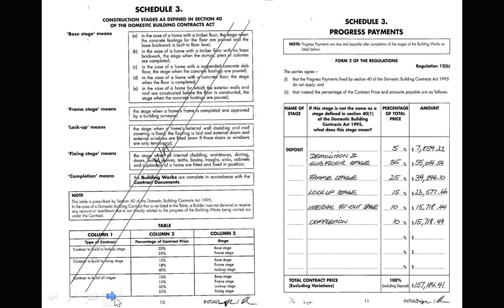But if you don't like it, what we can do is I can go to the bank and say, give me a facility to finance this amount, so that they will actually then provide me with the 25% money that I need to get this project going, and then I'll just pass on the cost to you. So I got the cost of this financial facility and put it to the client. The client was a bit tight, and the client decided to take the risk with paying more upfront and not having to pay more overall to service the builder's overdraft. So it's a calculated risk on the part of the client once they were informed as to what was going on.